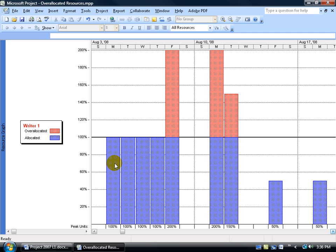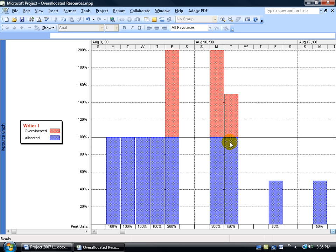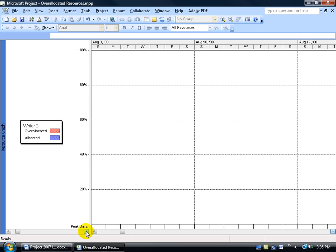In the graph view, you can find out exactly which days a resource is over-allocated and by how much. The typical working days at full 100% are fine; these are working part-time at 50%. Here's the day where the first 8 hours they're fine, but when they go beyond it, they're over-allocated. On this particular day, instead of going from 8 to 8 hours like the other two days, this one goes from 8 to 4 hours — but they're still working 12 hours, which is 4 hours beyond their typical 8-hour day. Writer 2 isn't in red, so that resource isn't over-allocated.